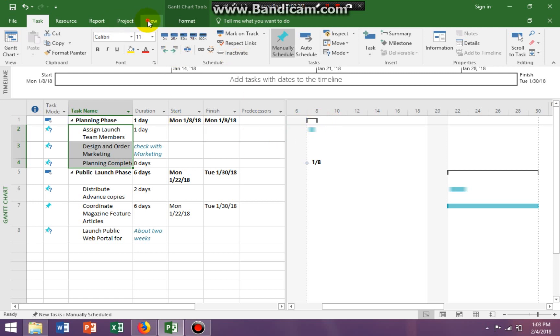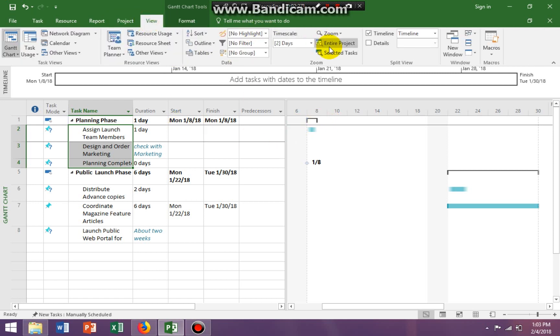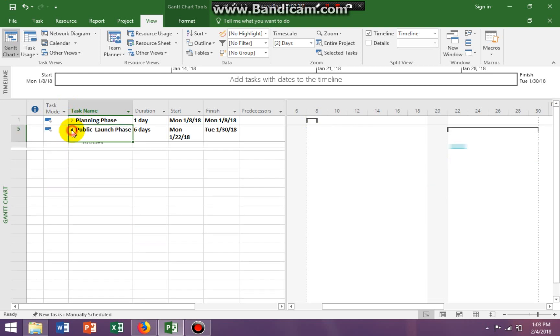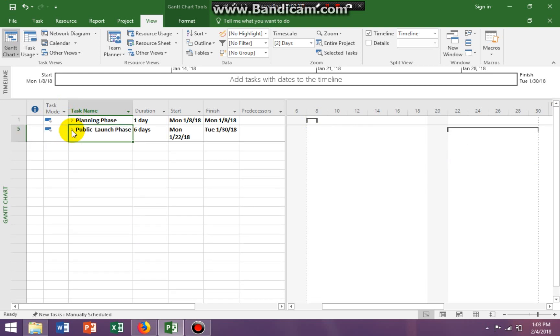I have, if I go view and say entire project, I can see that this is a summary task. This is a summary task as well. So planning phase will roll up and public phase will roll up.